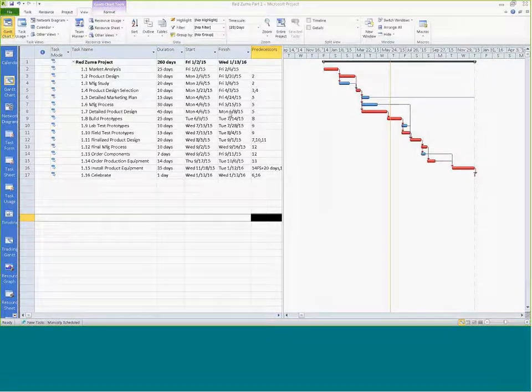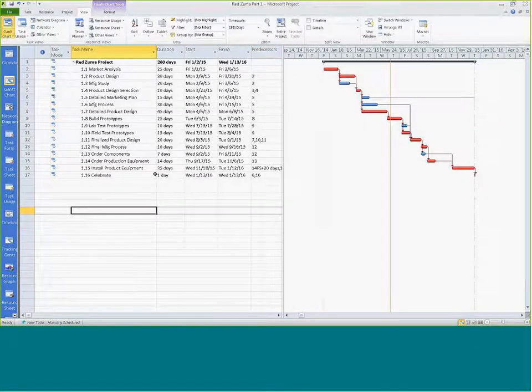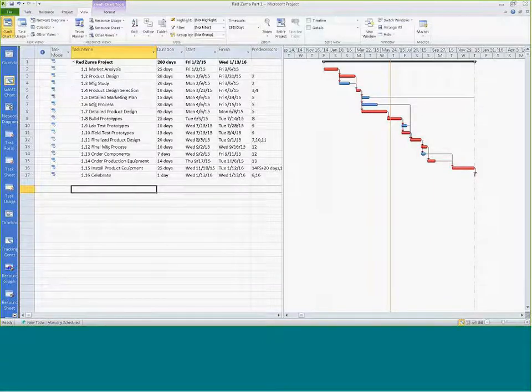That's a pretty sensitive project, meaning if two-thirds of the activities in our project were to change, the project duration could change. If two-thirds of your activities changing could change the end or the duration of your project, I'd say it's pretty sensitive in that regard. Then we want to identify, and this is a rather strange way of asking, two sensible milestones. Explain your choices.